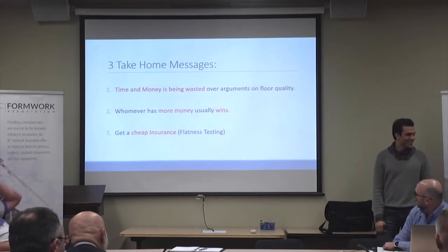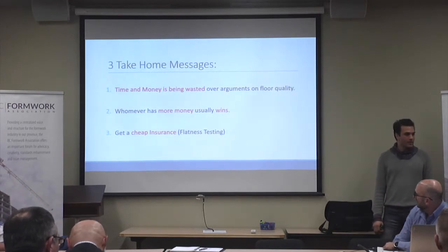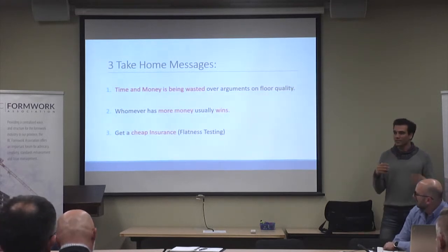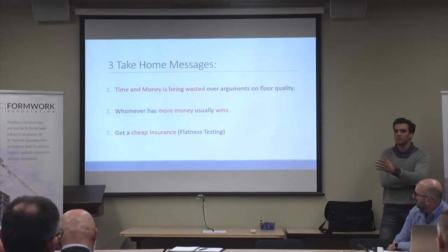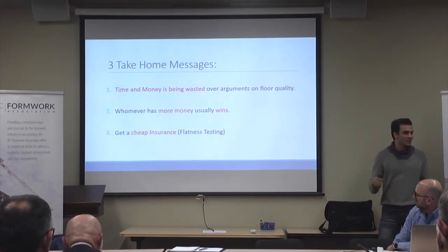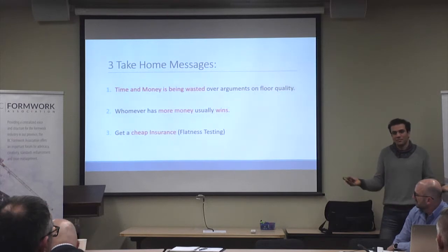So in hindsight, as Brad was saying, the general contractor just told him to stick it. But you are a legal representation of every floor. If Brad had a ton of money, he could have gone to court. You're an independent engineer with an acceptance system. That's correct, because, for example, the general contractor might send somebody off and say, okay, we tested that, but no one is going to believe it because that's the general contractor himself. If you go measure it and then say it's a pass, it's not going to be quite dependable because of how it will be viewed. So basically, you're a third party here to just do the test. Okay, it's a pass, it's a fail.